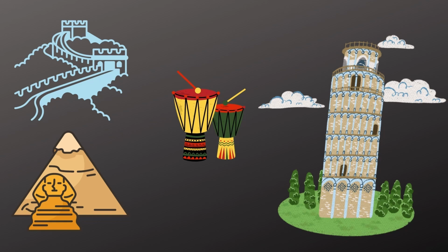Step number 9 is the heritage status. If the property is considered a heritage property, then you must get a permit for that. Basically, you must submit demolition and proposal drawings in front of the committee. They will review the drawings and comment on them, like if they have any objections or suggestions. Overall, that also increases the project timeline, so make sure about it.